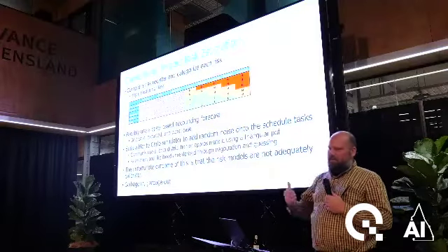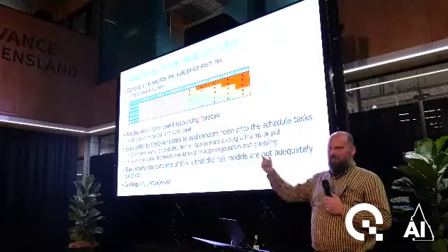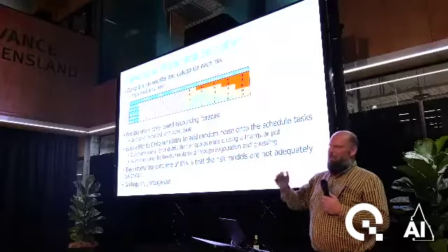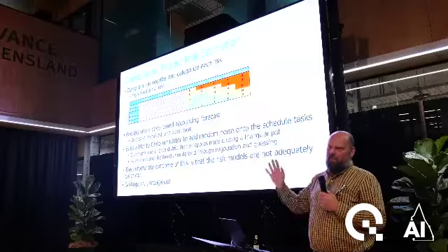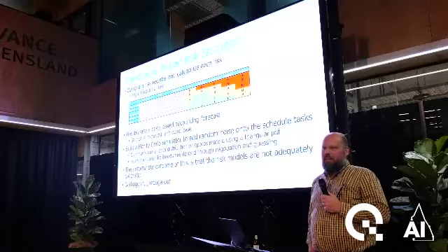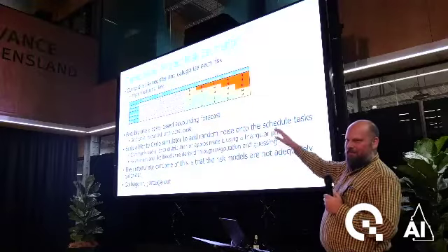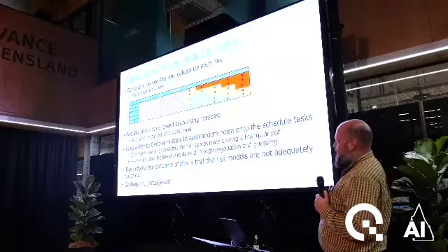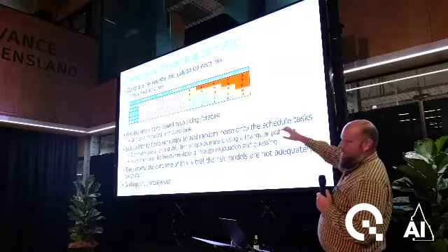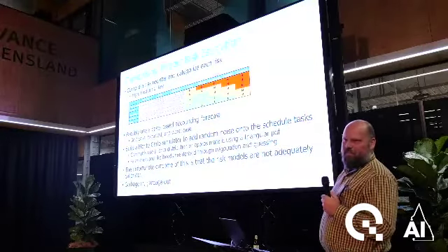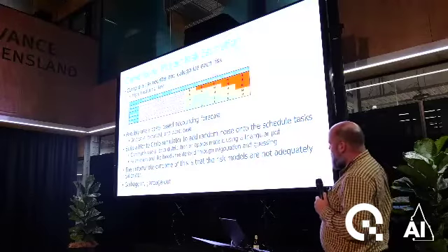Well, first they'd have to make up a risk. So there's a risk of this, and they'd ask, what's the chance of it happening? They'd make that up, and then they'd make up the possible financial impact, right? So you've got a whole list of things where people have made up numbers and made up probabilities related to those numbers. Then the management would go and calculate the expected outcome, and they'd have some number to discuss in board meetings and things like that.